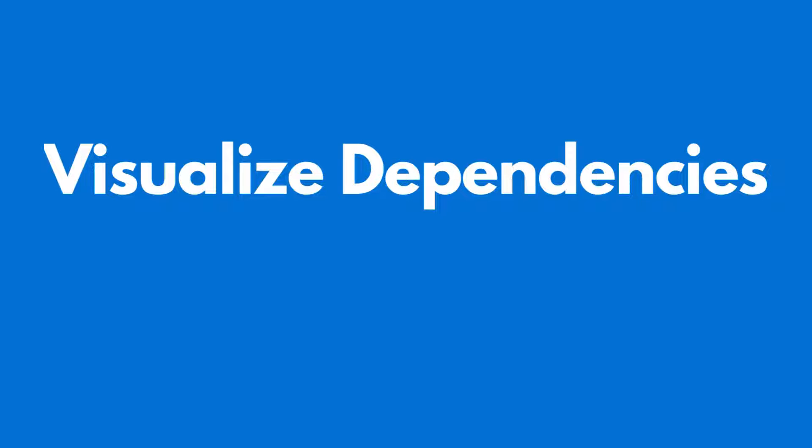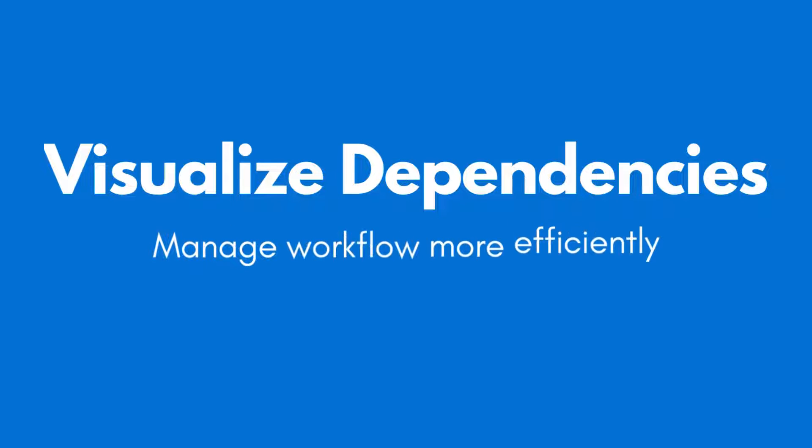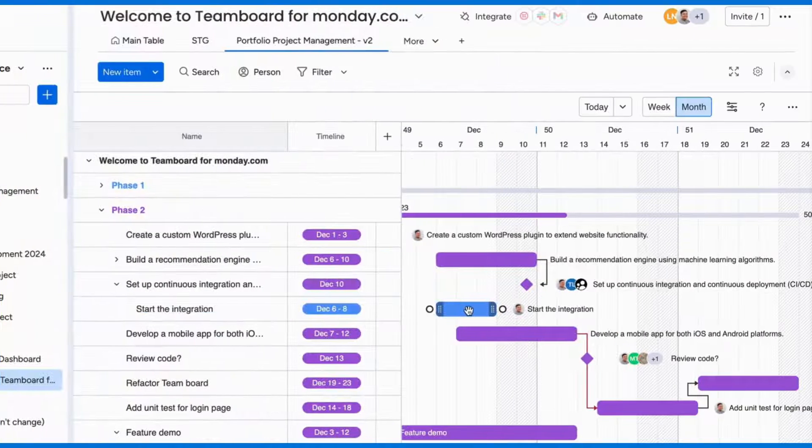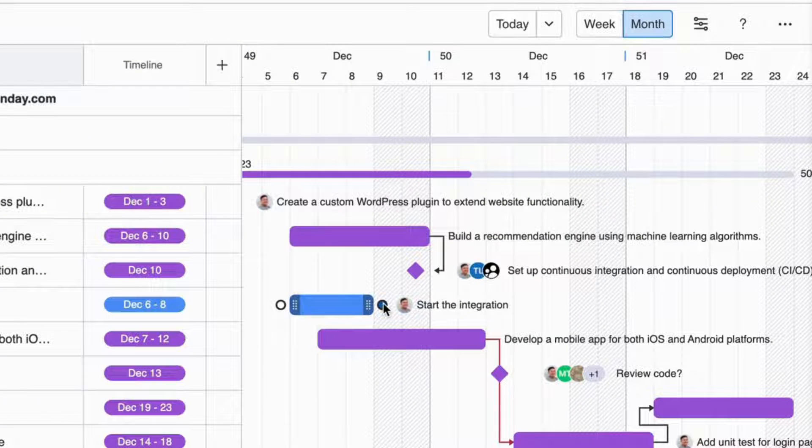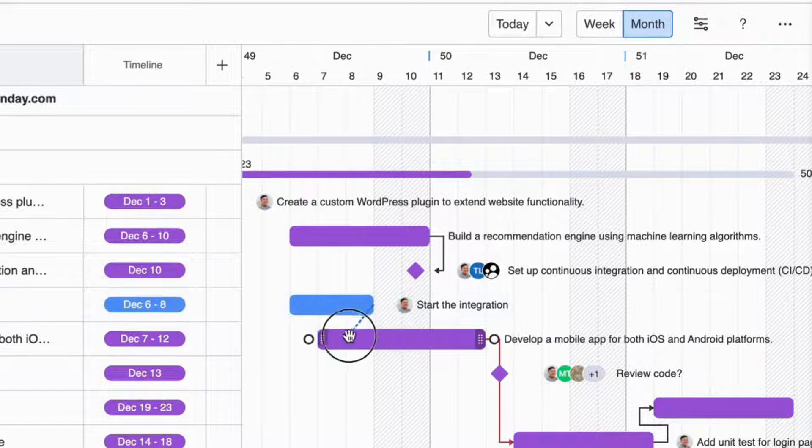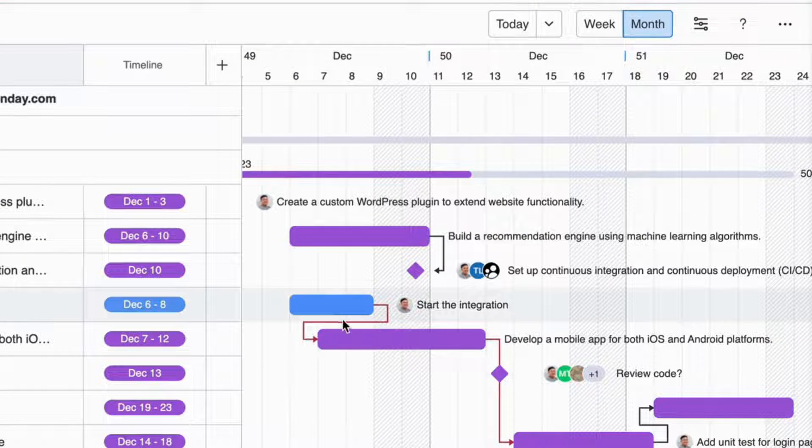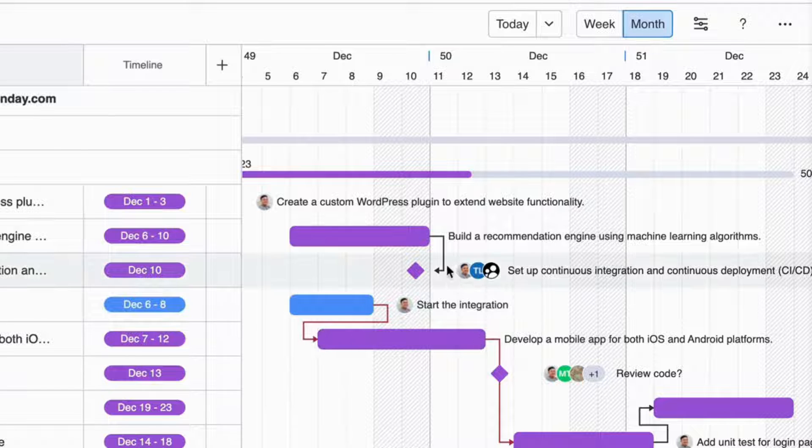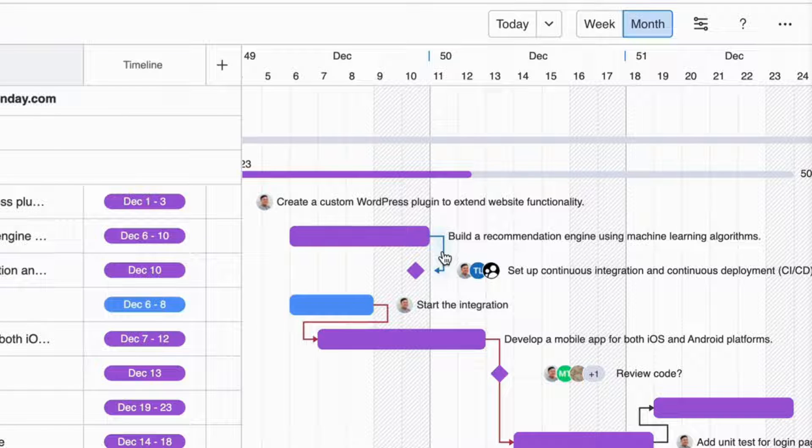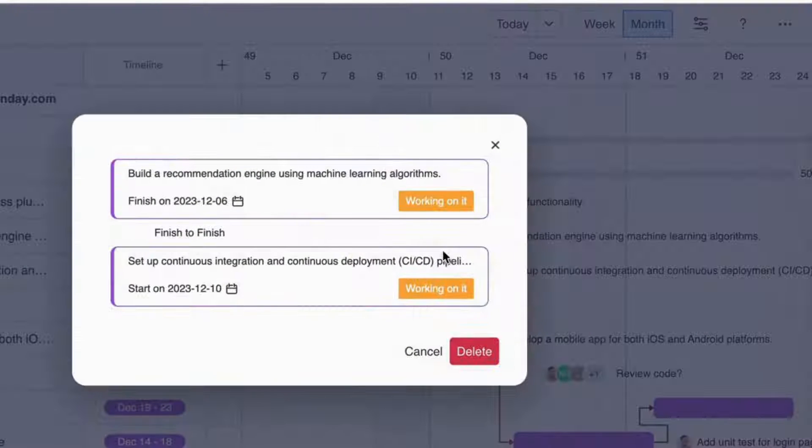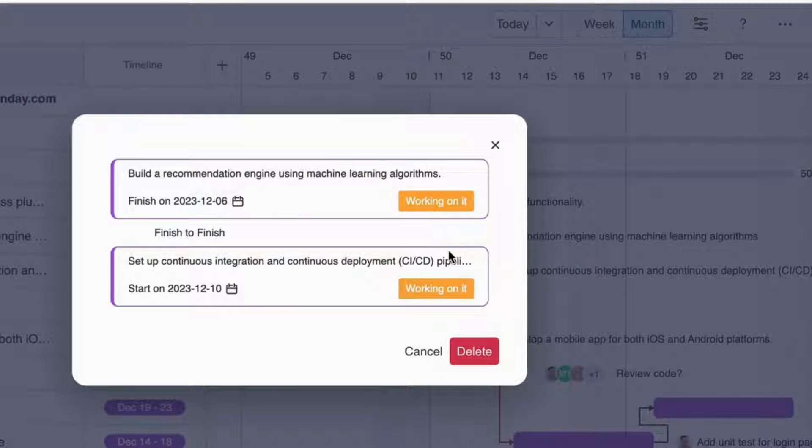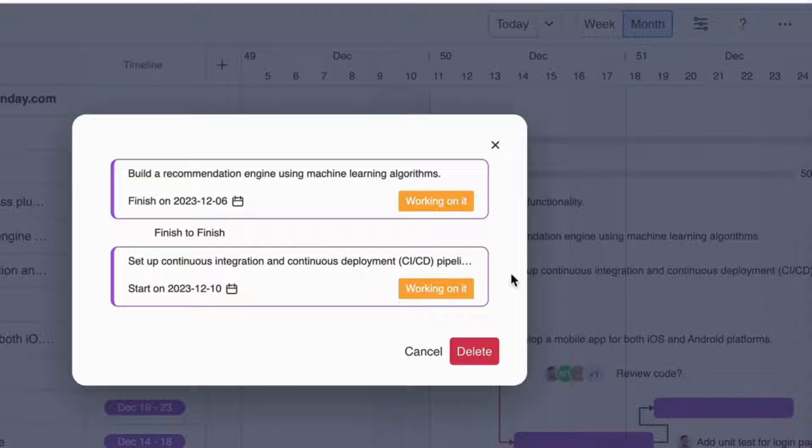Visualize task dependencies to help you manage workflow more efficiently. To make this visualization, you can simply hover the cursor over a specific task, then click on the showing dot, and drag to another task. This indicates the relationship between tasks and in which logical sequence they should be completed.